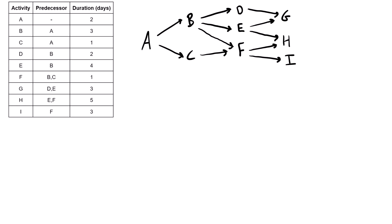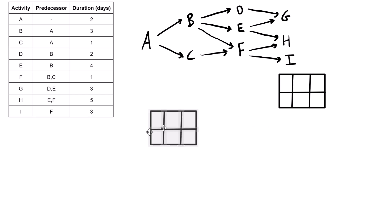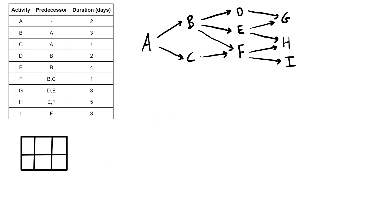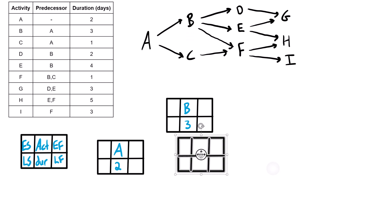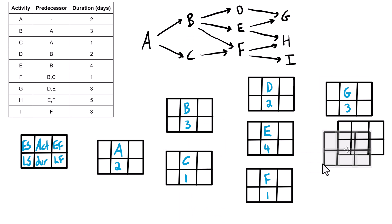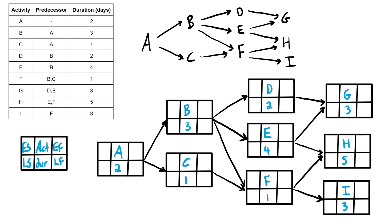Moving into the formal copy, let's set up our convention. We'll use a labeled box as our legend: the activity name goes in the top middle, the duration in the bottom middle, early start in the top left, early finish in the top right, late start in the bottom left, and late finish in the bottom right. We can now redraw the rough sketch, replacing each node with one of these boxes.